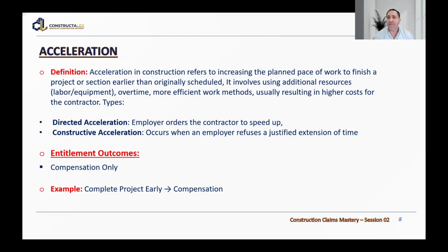Later, the contractor will use the acceleration claim to cover his losses in the extra cost that occurred because of the acceleration. But it's very critical and risky if later the contractor couldn't prove that he is entitled to an extension of time. So in such a case, it's not acceleration, it's a recovery, or a mitigation to recover the delay.